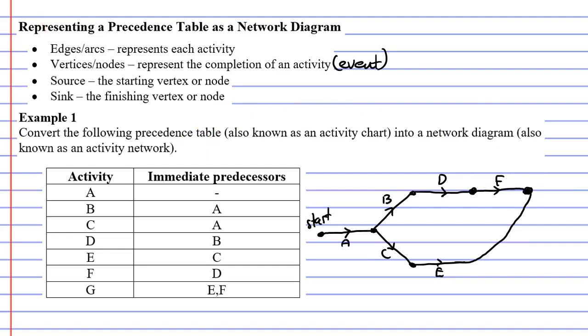And from there, I will put down an edge which represents activity G. You can see that this works quite well because when activities E and F finish together or are completed together, you then can have a single edge for activity G.